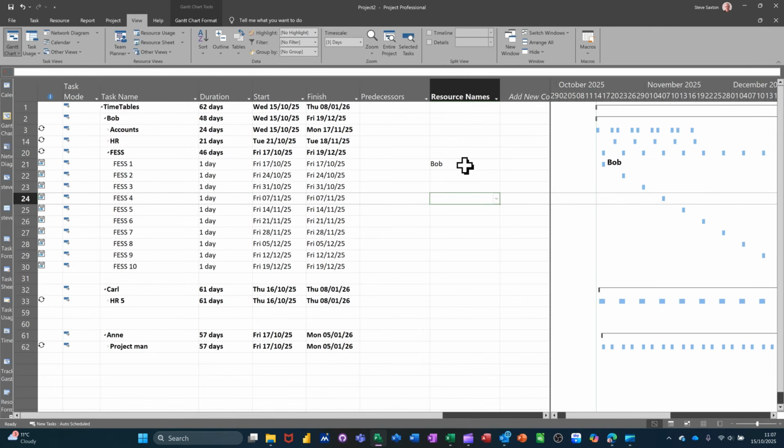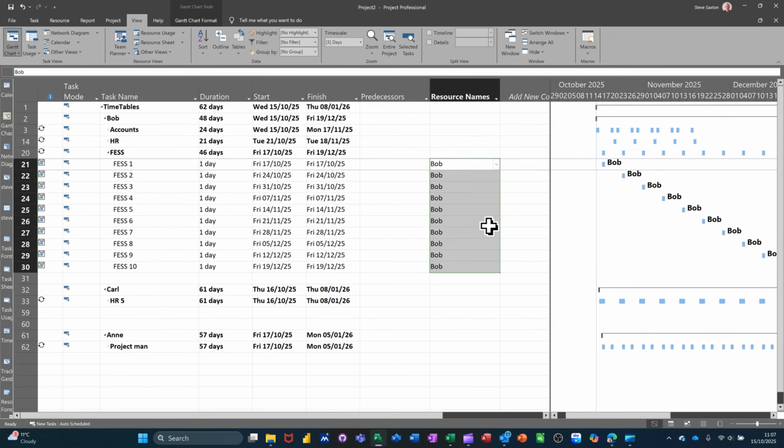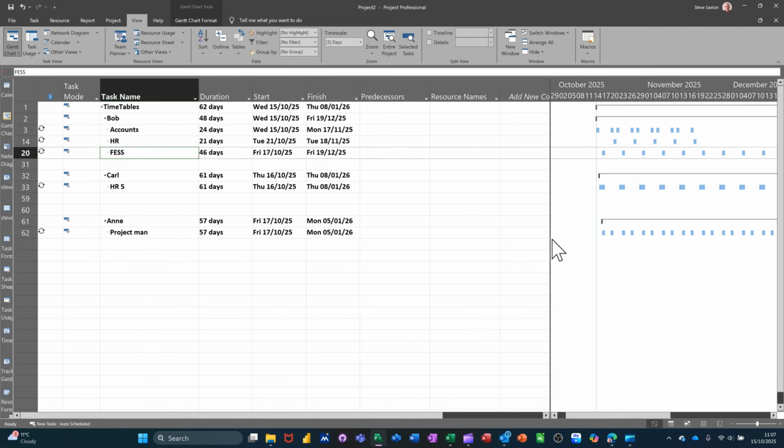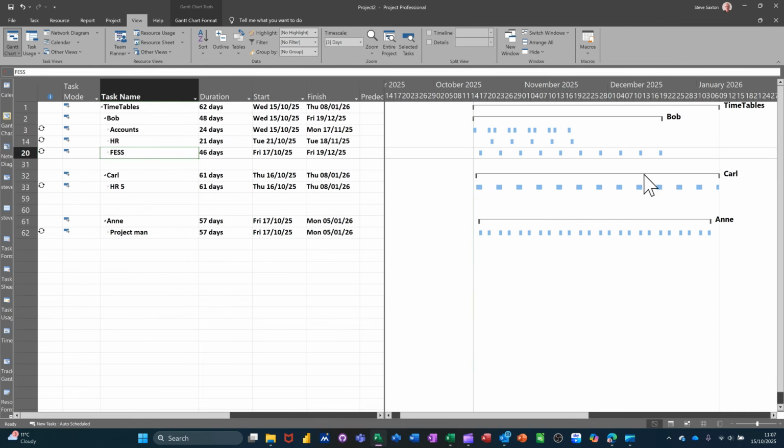if there's an over allocation in terms of time, you'll get a red man appearing. So there's no red men, so he's okay. So Bob's okay in terms of allocated time, because that's what you'd be doing this for, to make sure that your staff is not over allocated. So you can see, you're looking at these little slots here, that there's no slot doubling up, so Bob is okay. But if you did put Bob on something else, like on this one, even though it's down as Carl,